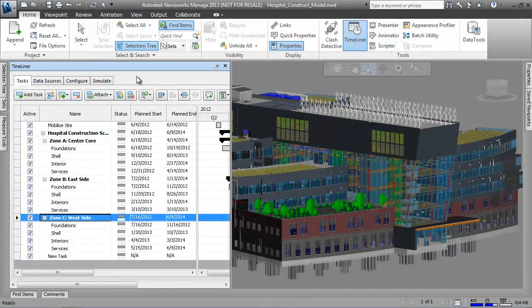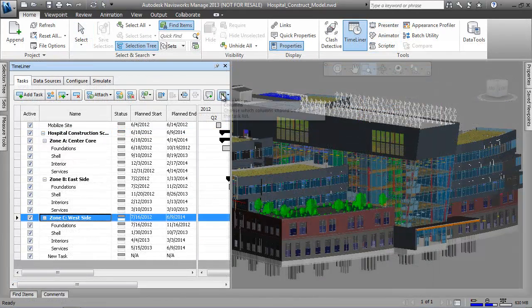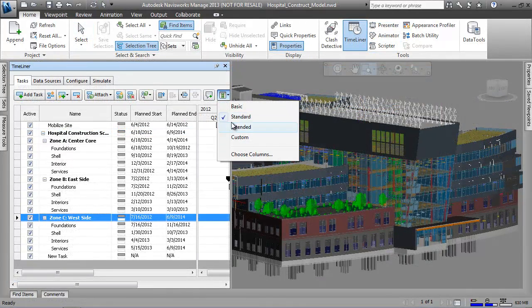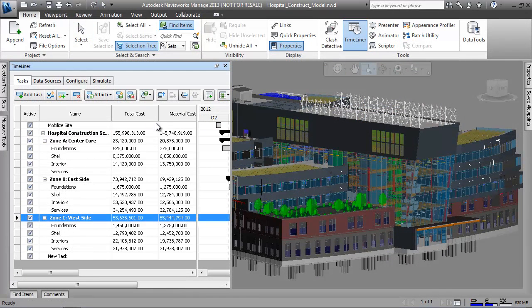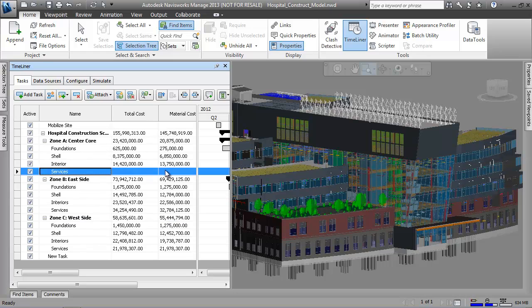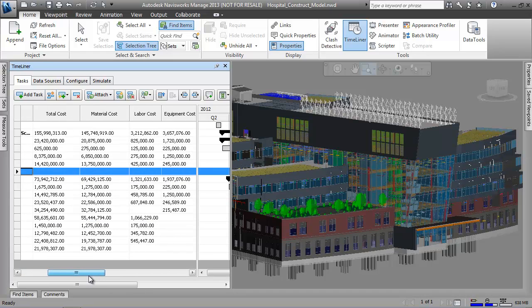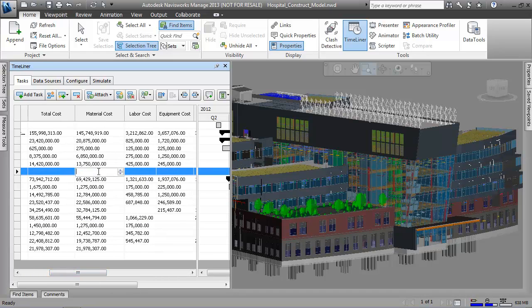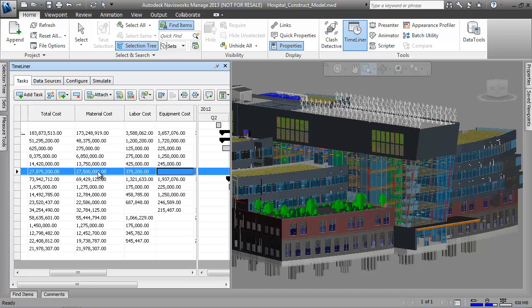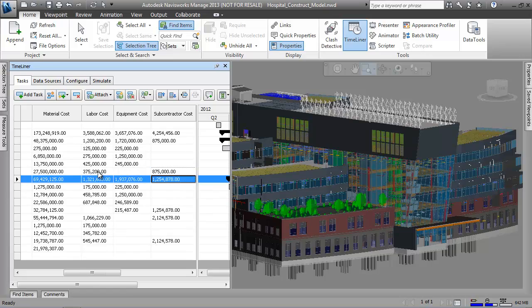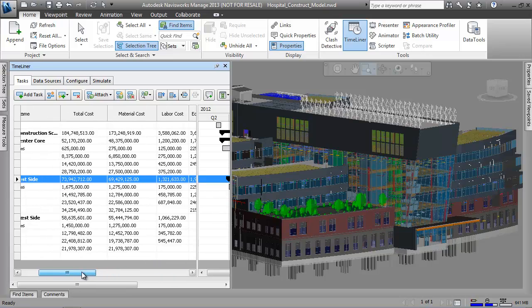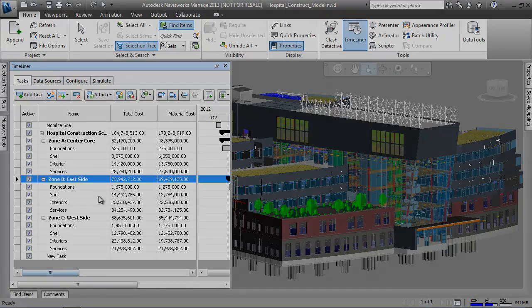Further enhancing the analysis capabilities, we can also attach costs to the tasks and create a cost-loaded schedule. By having these categories loaded into our schedules, we can simulate how our project costs are accrued over the entire project duration, as well as take a snapshot of expected costs at any point in the project schedule.